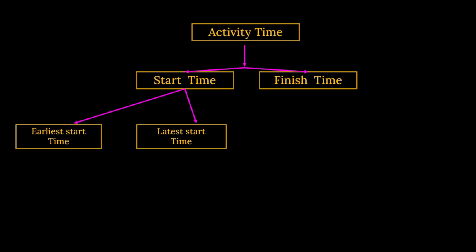So either you can start on day 0 or you can start on the third day, because you know the actual work will take 4 days only, whereas you have 7 days in your hand. Either you start on day 0, finish on the 4th day, and relax for 3 days, or you relax in the beginning 3 days and work the last 4 days. You got my point? So earliest you can start or latest you can start.